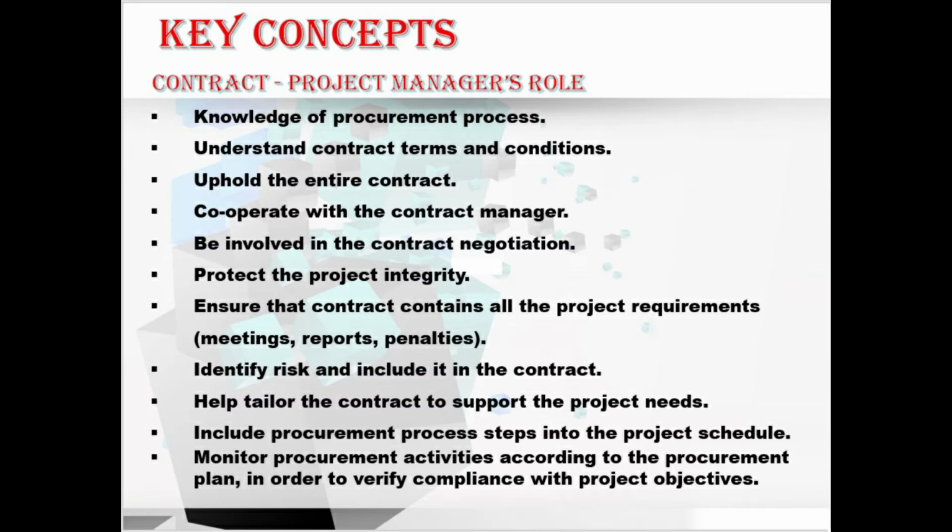And also he has to identify the risk and include it in the contract. And also he helps in tailoring the contract to support the project needs. And also he includes the procurement process steps into the project schedule. And also he monitors the procurement activities according to the procurement plan, in order to verify the compliance with the project objectives.